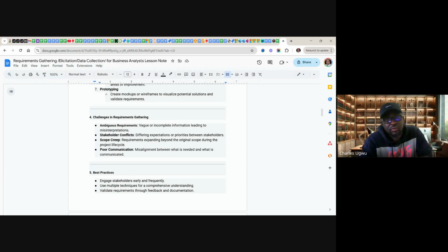For instance, if you are trying to implement an ERP, most ERPs serve the whole organization. In a situation like that, you are gathering requirements from the finance department, the sales department and the ITSM unit, and if you combine all of them in one group, there will be a fight. You need to separate them into different groups so that there will be peace.